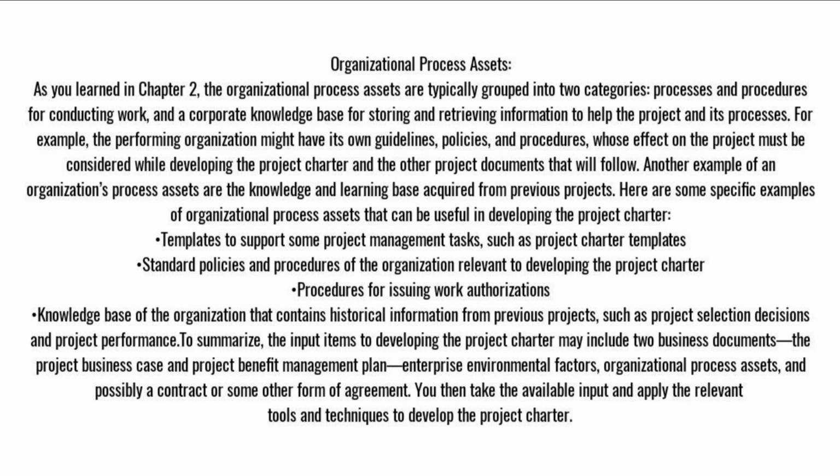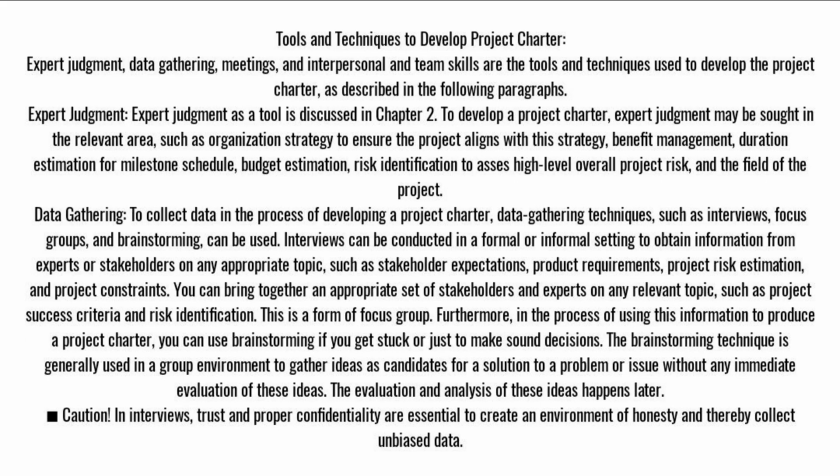To summarize, the input items to developing the project charter may include two business documents, the project business case and project benefit management plan, enterprise environmental factors, organizational process assets, and possibly a contract or some other form of agreement. You then take the available input and apply the relevant tools and techniques to develop the project charter. Tools and techniques to develop project charter. Expert judgment, data gathering, meetings, and interpersonal and team skills are the tools and techniques used to develop the project charter, as described in the following paragraphs.